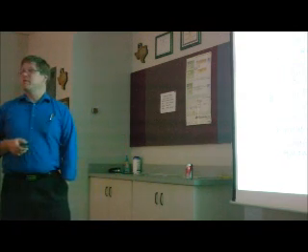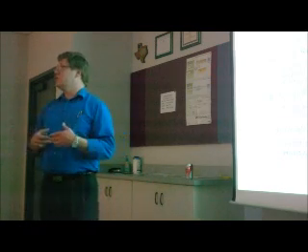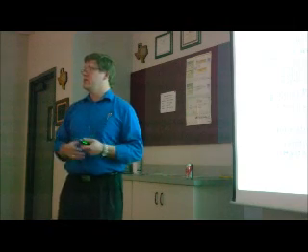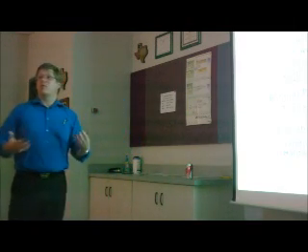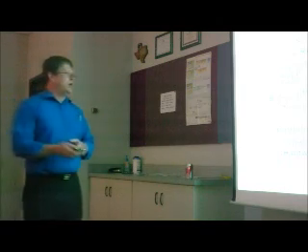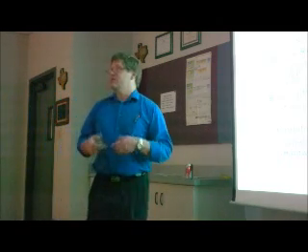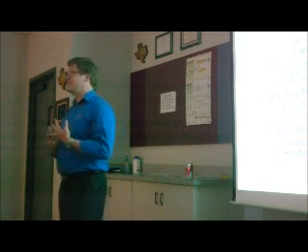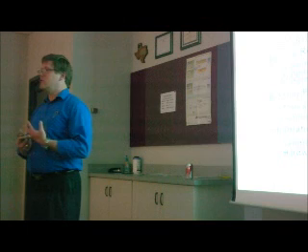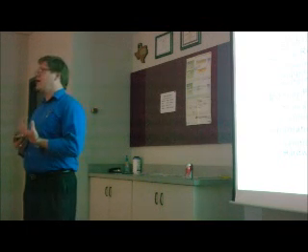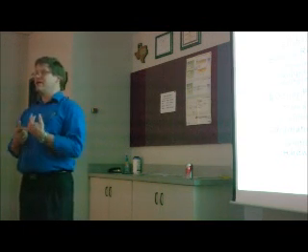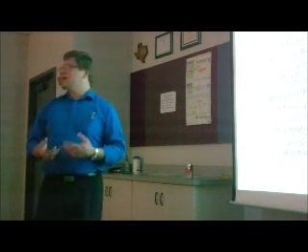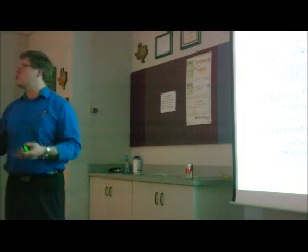You also need to let them know what the bidding process is. Is it open bids or is it closed bids? Are they going to be able to see what other vendors are bidding, or are they not going to be? So you need to lay the groundwork for that up front. And then any information required from the vendor. You want to know, is this a trustworthy vendor? Is this a vendor that's been around? Have they done other projects like this? Because if this is their first one, you would probably anticipate a lower price, but you'd also probably anticipate problems. They haven't done this before, it's their first time. They're going to have to work out some of the bugs. So maybe there's a trade-off there.